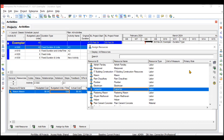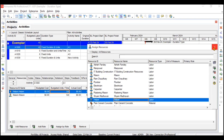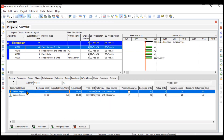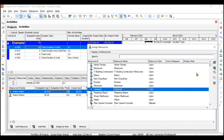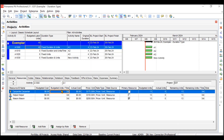Instead of a mason, let's assign a helper. Now you see the difference: after adding one more helper, the duration and budgeted labor units remain the same — 40 units, 40 hours of work for this activity, and duration stays four days. What it does is reduce the hours per day; units per time has changed because of the additional resource. It has divided the hours between the two laborers to five per day each. If I add one more resource — a carpenter — it will further make it about 3.3 per day, so it has not affected your duration or total units.